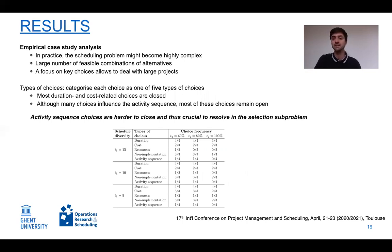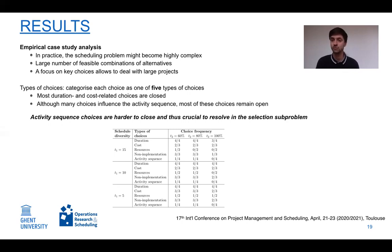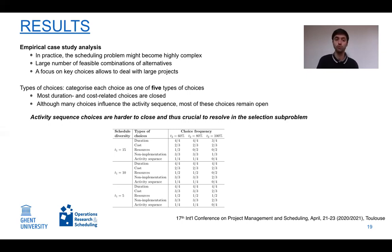We also categorized different types of choices based on real-life case studies. Alternatives exist due to differences in duration, cost, or resources used, the non-implementation of certain activities, or a difference in activity sequence for the work package. Most duration- or cost-based choices could be closed relatively easily, while choices based on activity sequence could be closed with less certainty and remained open most of the time.